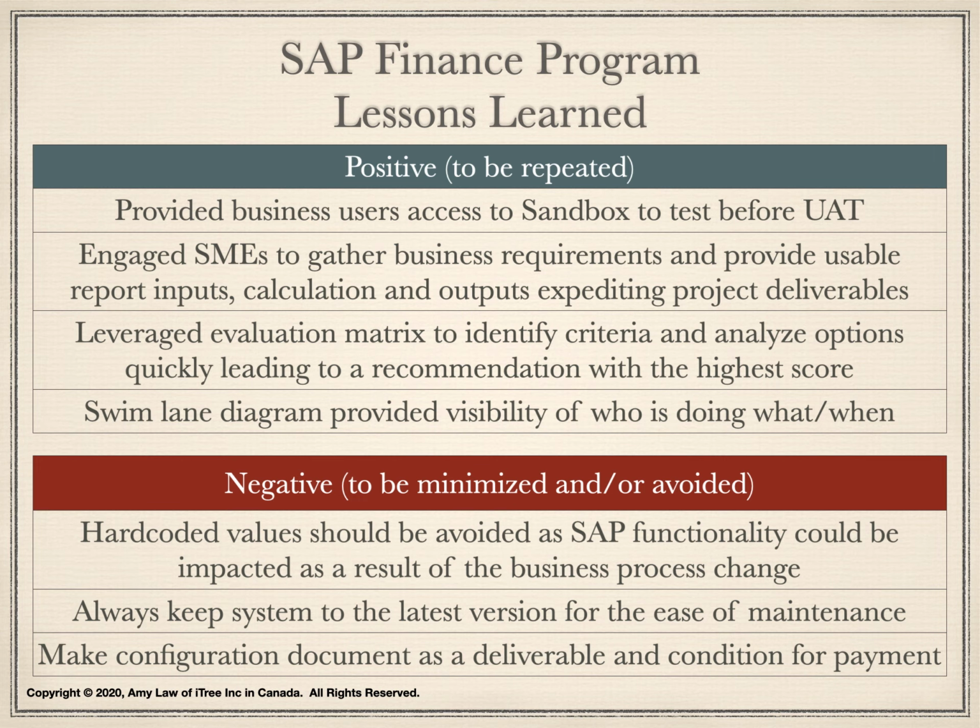Last but not least, make configuration document a deliverable and condition for payment to vendor. Ideally, we provide a configuration document template to a vendor and have the vendor fill in the blank, including the descriptions, how-to steps, and screenshots.